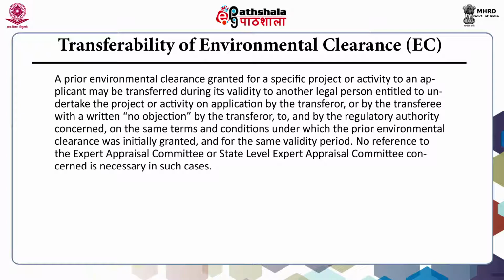A prior environmental clearance granted for a specific project or activity to an applicant may be transferred during its validity to another legal person entitled to undertake the project or activity on application by the transferor or by the transferee with a written no objection by the transferor to and by the regulatory authority concerned on the same terms and conditions under which the prior environmental clearance was initially granted and for the same validity period.